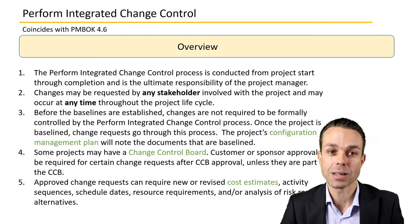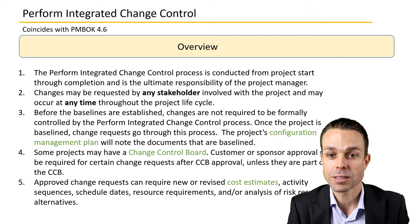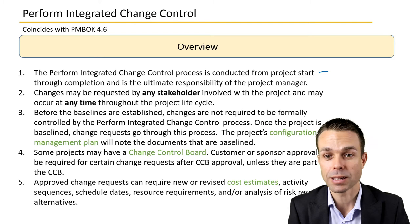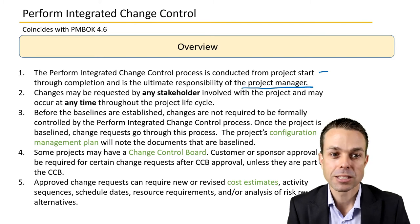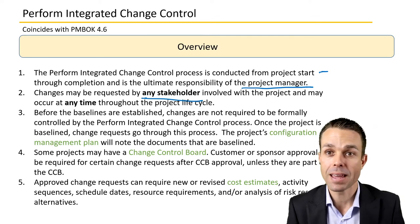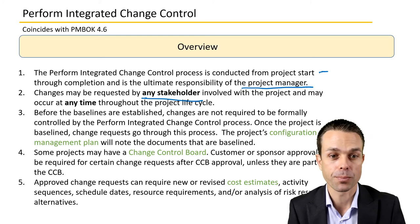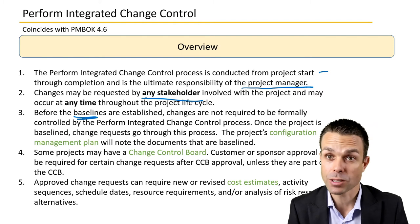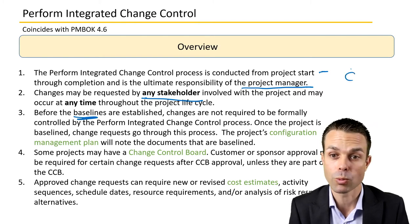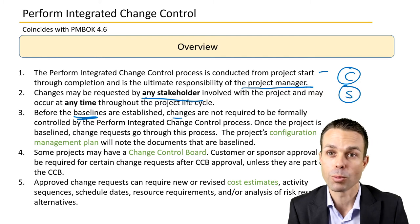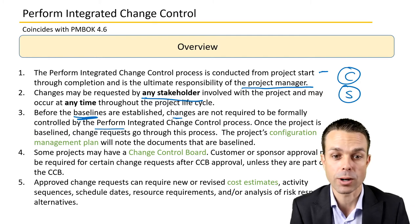Here's an overview of Perform Integrated Change Control. First of all, it's conducted from start through to completion and is the ultimate responsibility of the project manager. Changes can be requested by any stakeholder involved with the project, and may occur at any time throughout the project lifecycle. Before baselines are established — before something is locked in place at a certain point in time, like the cost or the schedule — changes don't have to go through the formal change request or the Perform Integrated Change Control process.